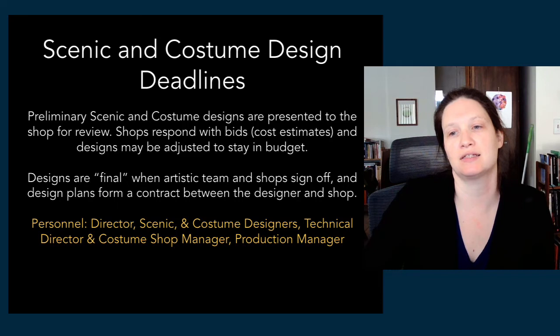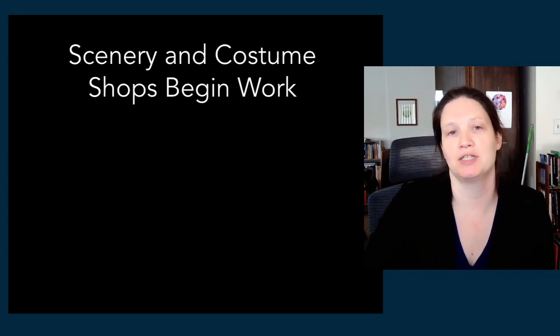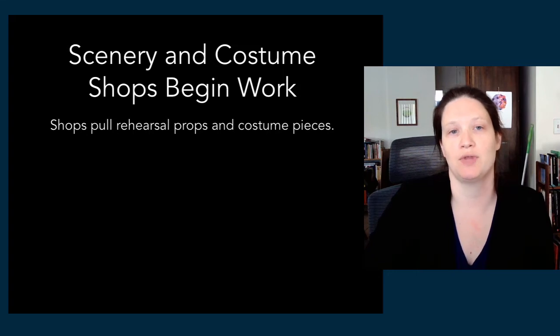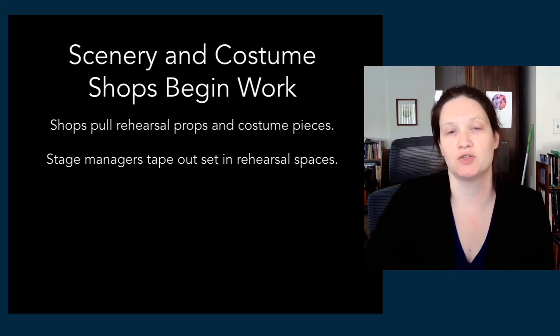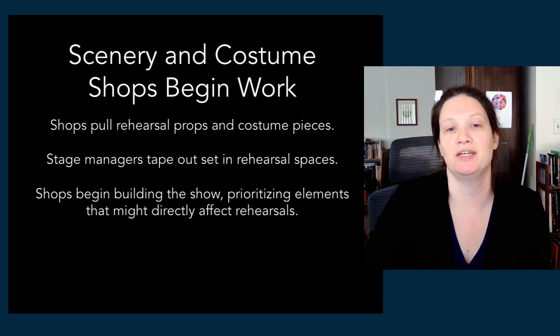So the next thing that's going to be happening is your scenic and costume shops will begin work. So they will pull rehearsal props and costume pieces so that they're ready for rehearsal. The stage managers will tape out the set design in the rehearsal space. So they will make a mock-up on the floor so that in rehearsal everyone knows what's going on. The shops will begin building the show, prioritizing elements that might directly affect rehearsal.